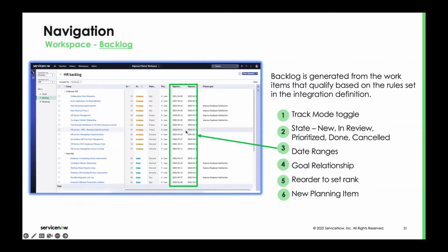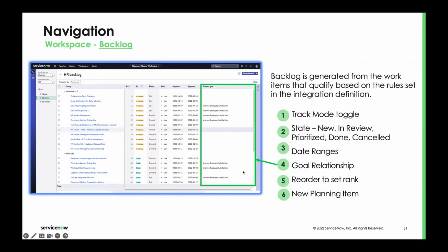Dates. This talks about specific dates, because remember, when you think about APW, it's going to want to use dates. What are my ranges? What am I working from, these dates? You do bring in the dates from your execution records, and then you have a set of dates you manage also. Depending on how you want to configure it, it can push those dates back, and you can inform the project manager or the Scrum Master that we've had a proposed date change against something coming out of the planning cycle, right?